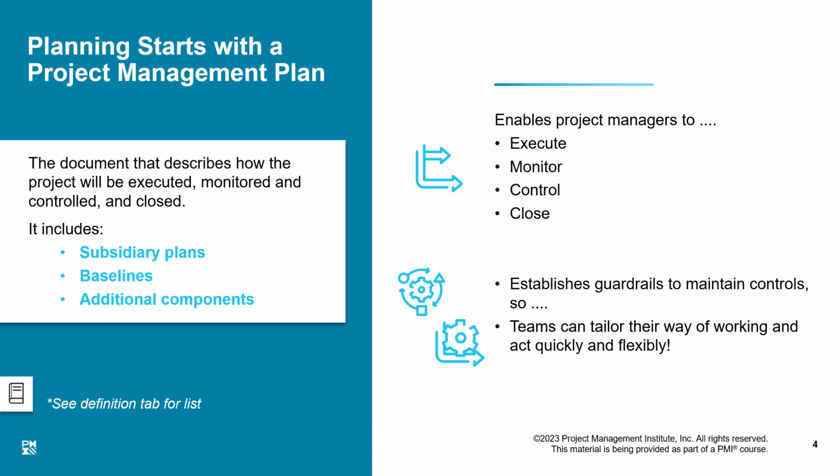Therefore, there is no individual impact of any of the knowledge areas except for the main baselines. So if any one of the three baselines will be disturbed, that means baselines, when they were finalized, they must have absorbed the impact of all other knowledge areas. So we don't need to create separate baseline for every knowledge area, but we will tweak the project until our scope, schedule, and cost are finalized. Naturally, all other knowledge areas have impacted that. And once we are comfortable that we have got these three baselines finalized, we consider our project to have been approved. I mean, the planning has been completed.